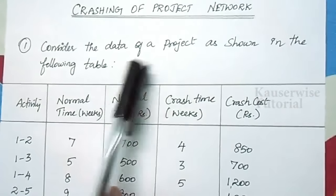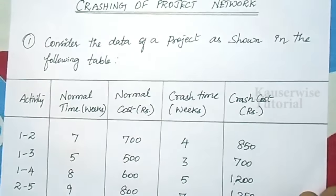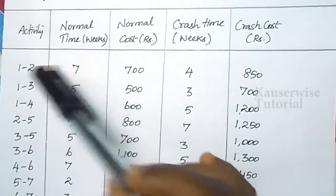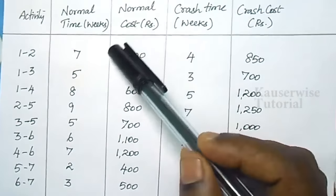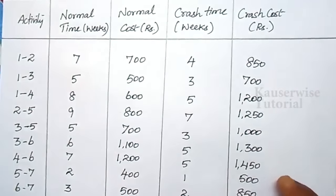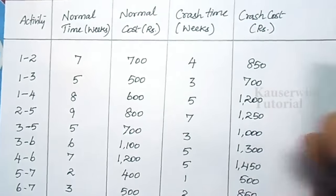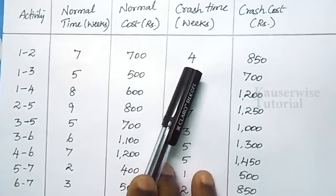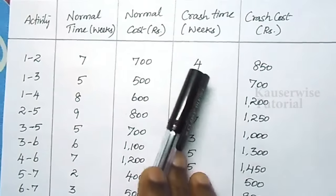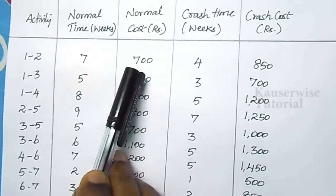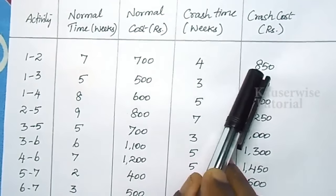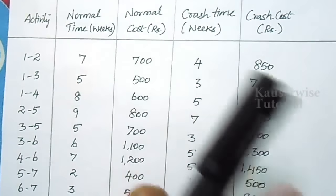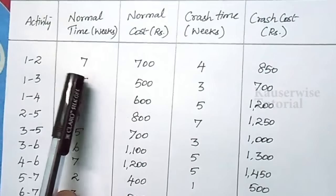Consider the data of a project as shown in the following table. Different activities are listed with their normal duration in weeks, normal cost, crash time, and crash cost. When we speed up the activity, the same activity can be completed in fewer weeks. Generally, when we speed up the activity, the cost will be higher compared to normal cost — for example, normal cost 700 and crash cost 850. So when we crash an activity, the cost increases while the crash time is lesser than normal time.